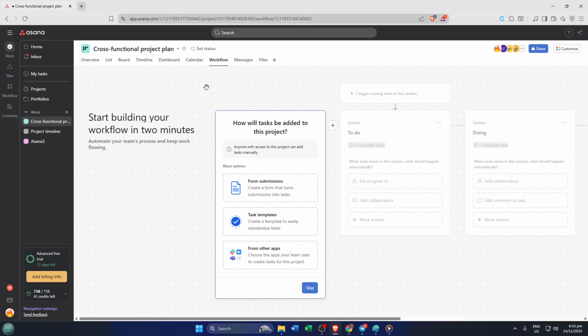Whenever you're facing a big, complex task, break it down into subtasks. So if launch new campaign is your main goal, create subtasks for writing copy, designing graphics, and scheduling posts. Only mark the parent task complete once every subtask is finished. Think of it like checking off every ingredient before you say the recipe is done.